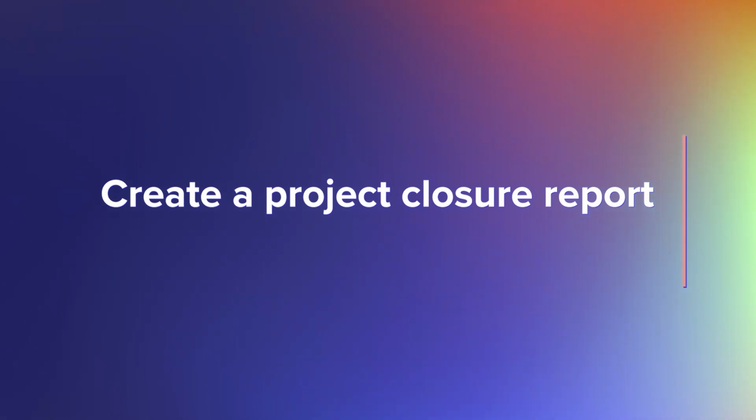Write a one-page report on the project with details that might be useful for your organization. Information to include would be things like the project name, stated goals, date of initiation, stated deadline versus actual date of delivery, project budget versus actual budget, team members involved, stakeholders involved, project issues and pain points, project wins, and just some general comments. Don't move on to the next thing too quickly.